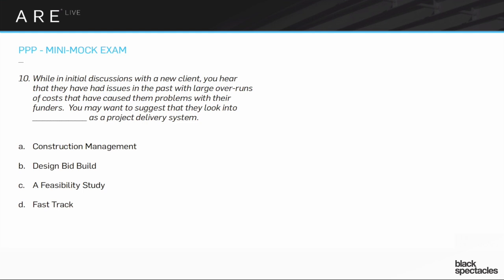If I have a design-build, it changes everything. It changes all the contracts, all the relationships. Instead of having the architect be sort of the agent of the owner, there's now this very different relationship of the architect to the owner because the architect is now allied with the construction process, not with the owner. So there's certain advantages to the owner and certain disadvantages to the owner.